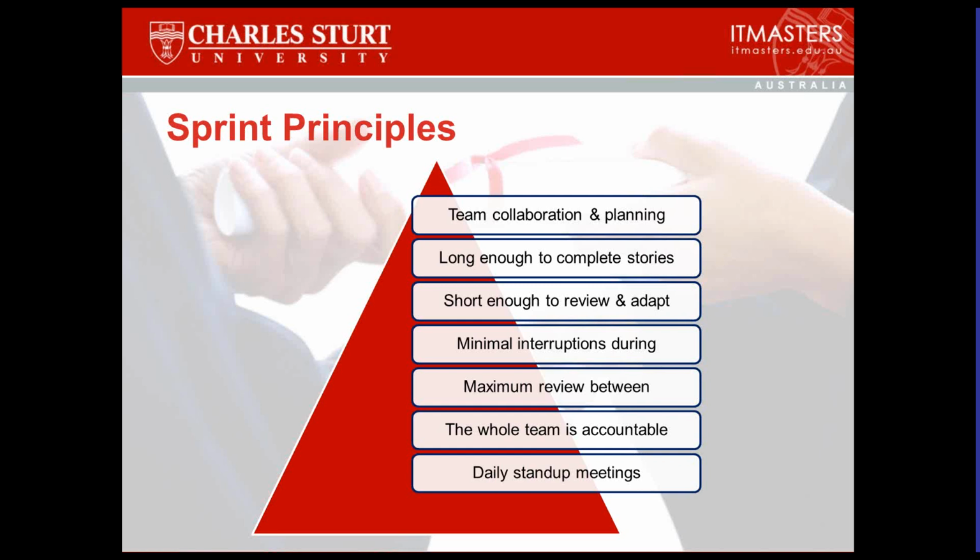But there needs to be a lack of planning interruption to that period of time. So what that means is that we're not going back to these hardworking individuals and hardworking teams and saying, well, I know you said you had that in the sprint this time. Let's can that. Let's pull that out and put this other thing in the sprint instead. And can you do that next week for me? That's not how the sprint works. The sprint should be locked in, and you get maximum efficiency of effort and continuity of concentration and outcome by minimizing interruptions.